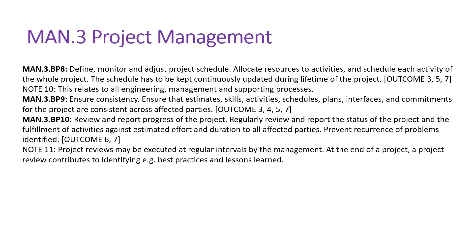BP9 talks about ensuring consistency. Ensure that estimates, skills, activities, schedule, plans, interfaces, and commitments of the projects are consistent across affected parties. You need to take care of estimation, resource skills, tasks, schedules - including planned start date, planned end date, actual end date, actual start date, and revised dates. You need to consider interfaces and dependencies, ensure commitments on deadline or acceptance criteria given by the client, and adjust the plan based on all these factors.